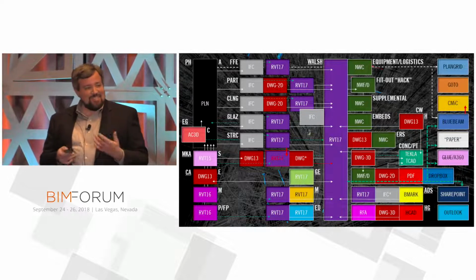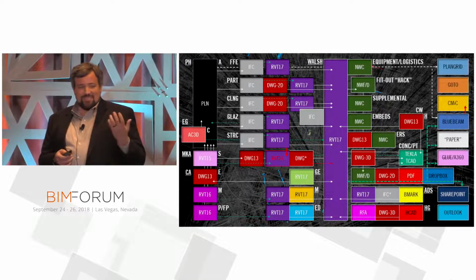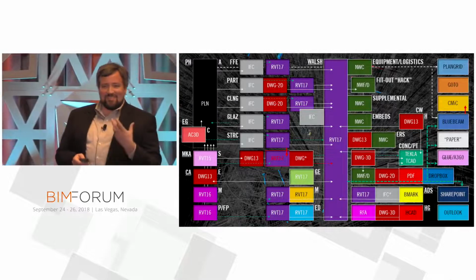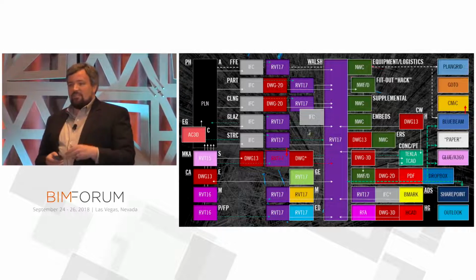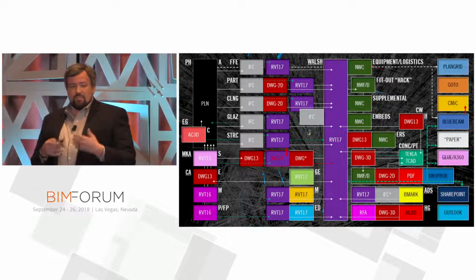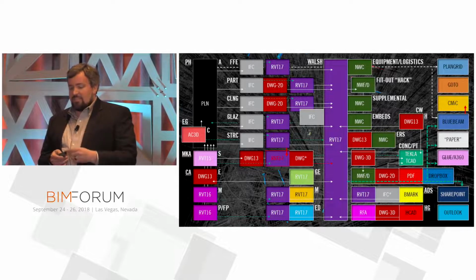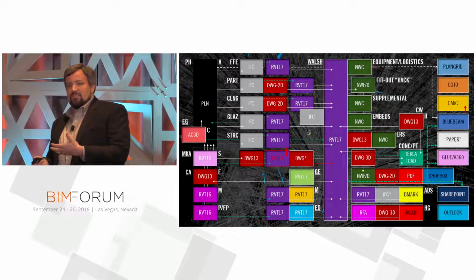Lucky for us, they're used to exchanging models in generic formats with their design team already. So Yorgi Todorov, this mad genius over there who gets on the conference calls with the voice of Dracula, which I love, and has done a lot of smart things in the model to help us out, was able to figure out a way to filter that information out into 5 separate exports along with the 2D backgrounds with all the notes and dimensions that we could then bring in on our side and use workset-based filters and visibility graphics. For our subcontractors, some of them were inheriting 2D sets, so they had to model from the ground up anyway. Others decided to just inherit the design models, upgrade to the latest version, and run with it. And still others decided, let's model in our own software and get it over to you.